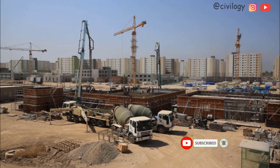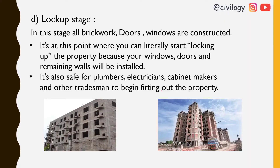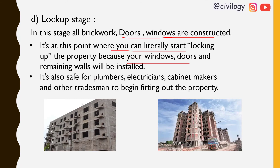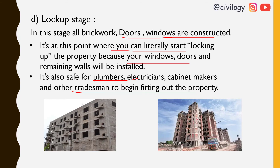In the lockup stage, all brickwork, doors, and windows are constructed. It is the point where you can literally start locking up the property because windows and remaining walls are installed. It is also the stage where plumbers, electricians, cabinet makers, and other tradespeople begin fitting out the property.